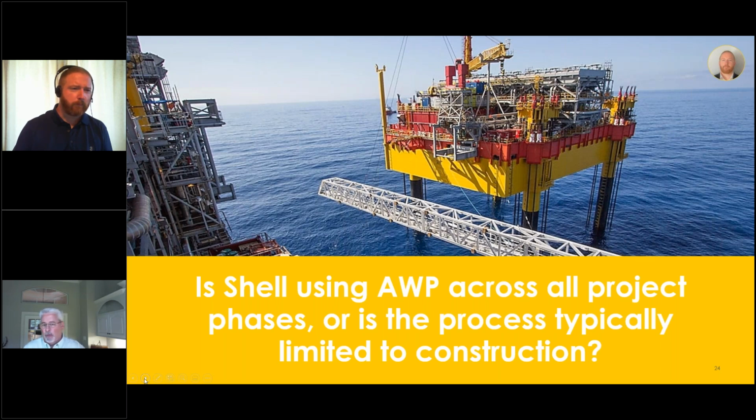We don't have material, we don't have the right stuff to do the work. The IWPs are not unconstrained. There's constraints against them. So for most of the large projects, I would say we implement fully if possible, starting in very early select, or what we call select. I think as an industry, they may call it pre-feed. But yes, we do.